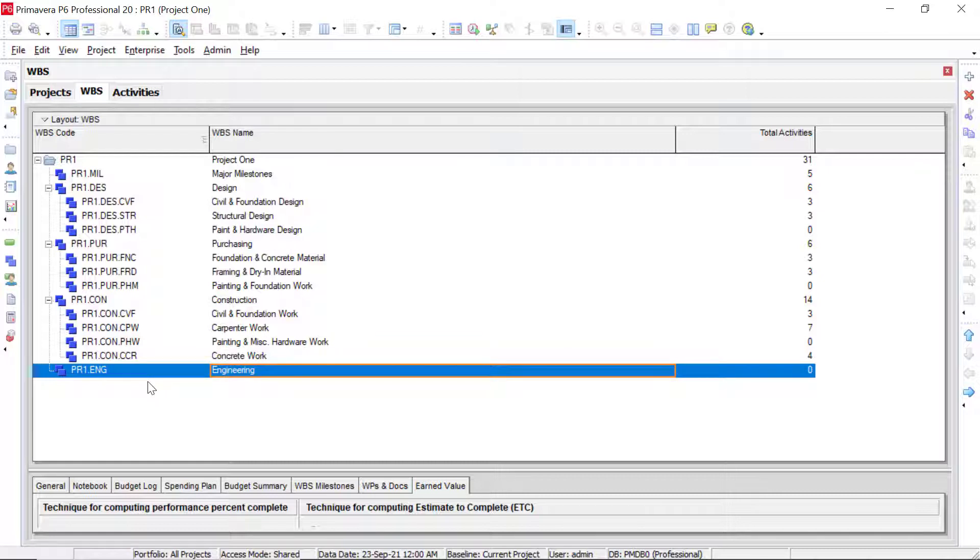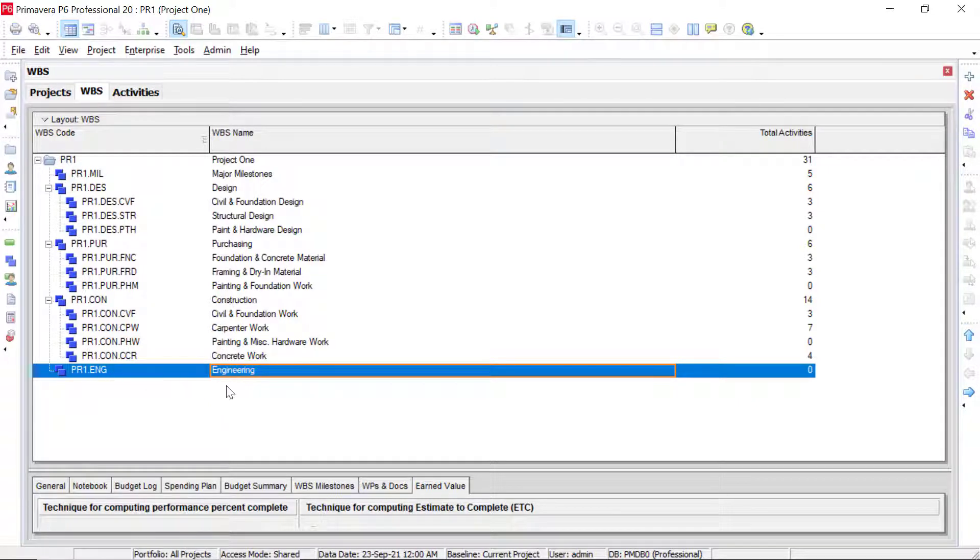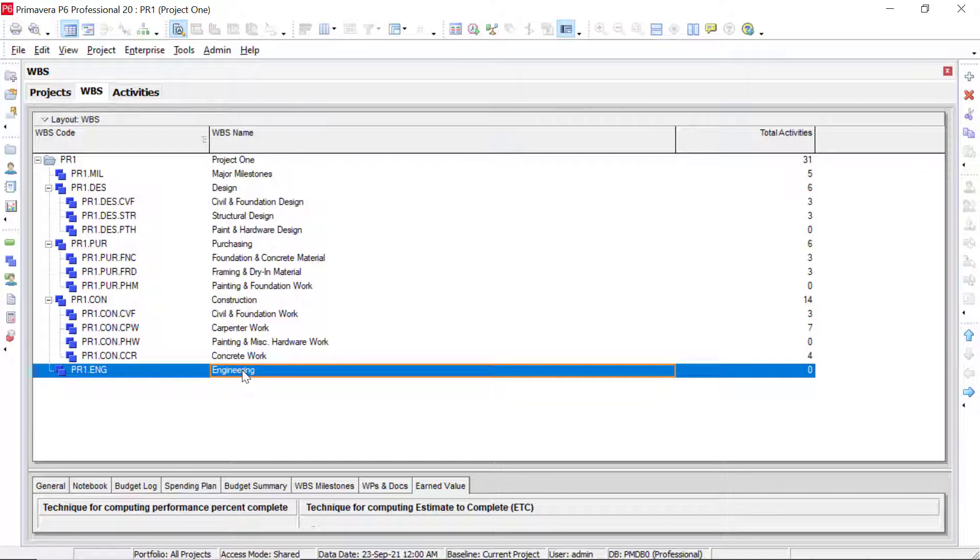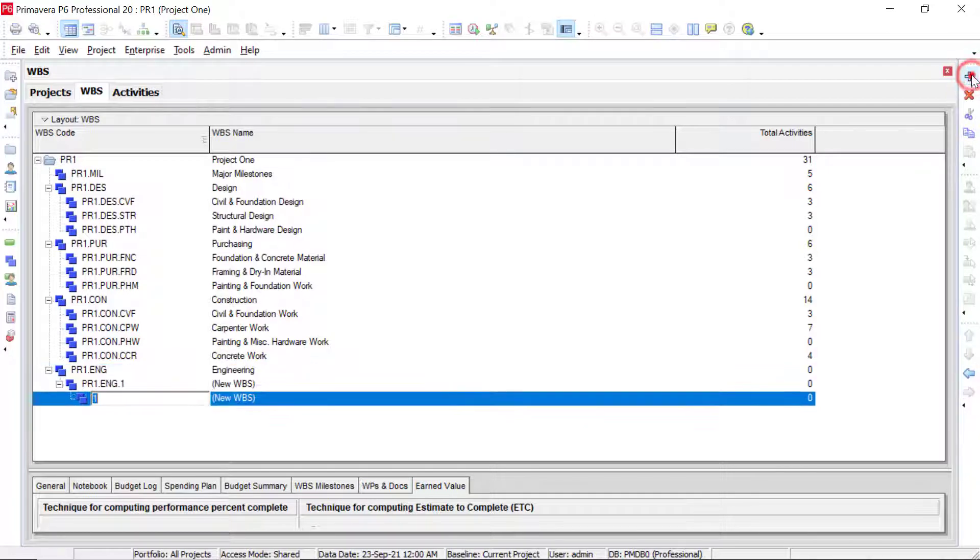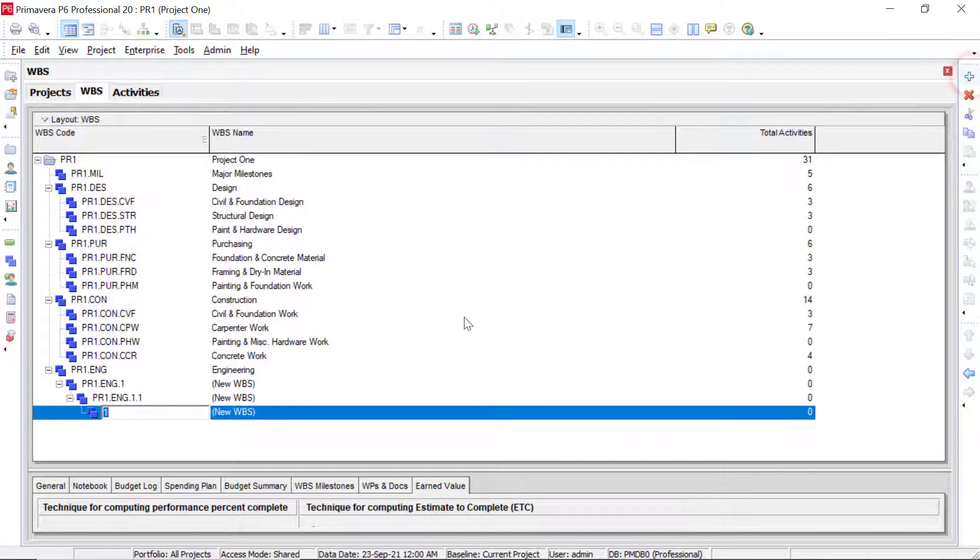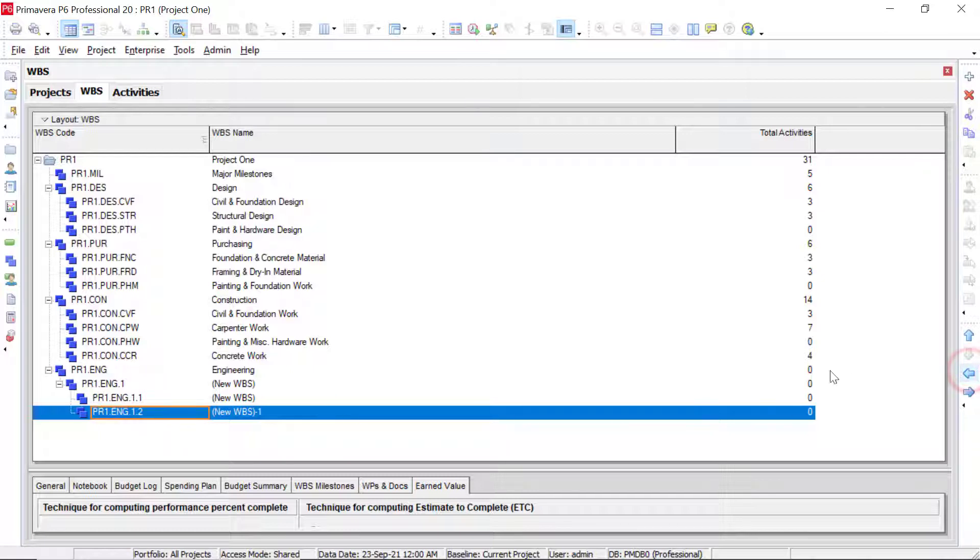We'd like to add in the same elements that we have underneath design. So that would be our civil and foundation design, or civil and foundation, structural, and then paint and hardware. So to do that, we're highlighted on engineering, we need to add in three different items. So notice if we just click the plus sign up here three times what's going to happen. Remember, it's going to create that parent to child relationship based on whatever you are selected on. So what we could do here is we could kick each one of these over because we want all of these to be level three underneath engineering. So we could use the arrow key to kick that one over.